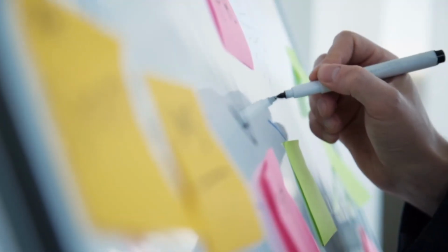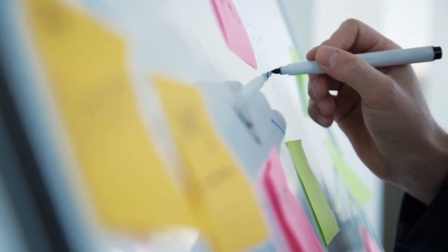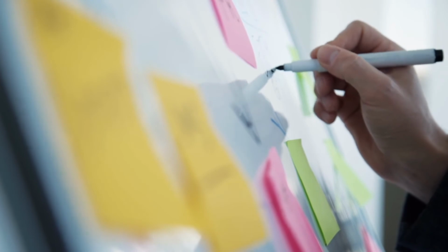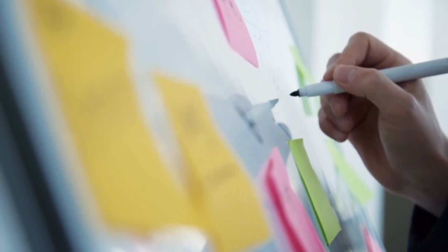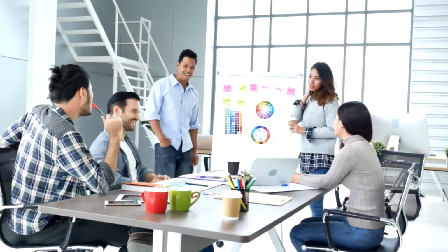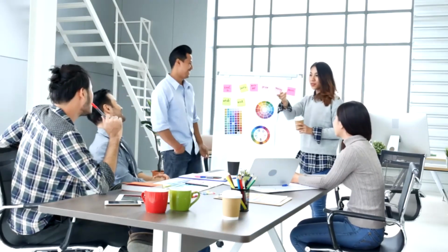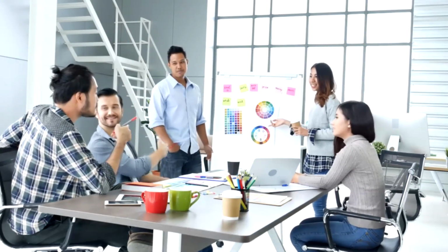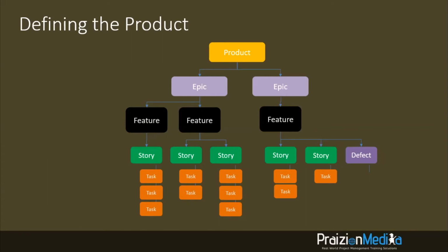And you can get a very clear picture of how work is going to be done on the sprint at this level. Okay? So the sprint plan is the stories and below. And in other planning, at a higher level planning, we're thinking about features and above.